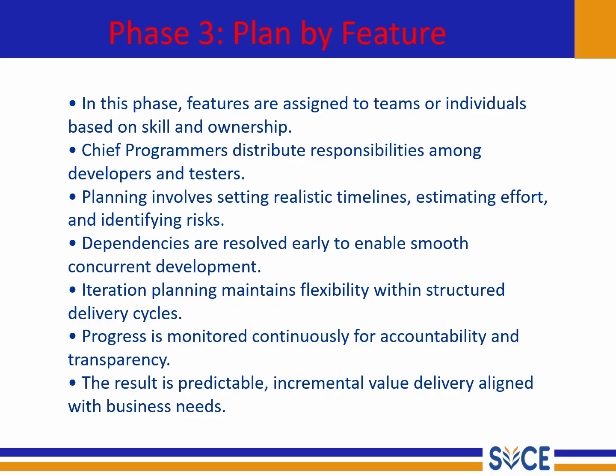Another crucial aspect here is dependency management. Some features might depend on others to be completed first. By resolving these dependencies early, FDD enables smooth concurrent development where multiple features can progress at the same time without blocking each other.